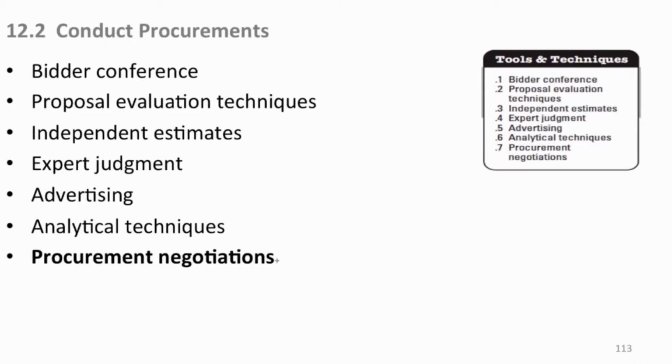Then you start to evaluate them. Once you have all that, you're going to pare it down to a short list by some criteria that you use. You may have 2, 3, 4, maybe 5 bidders individually either come in and talk to you, or you talk to them over the phone, or by video conference, or whatever it takes, to individually ask them questions to clarify their responses. And if it gets down to really a few, then you could possibly even start negotiating price. Now you're just talking to them: what's the best you can do here?